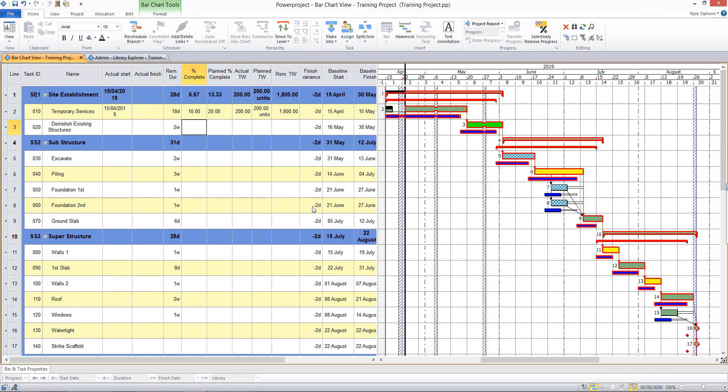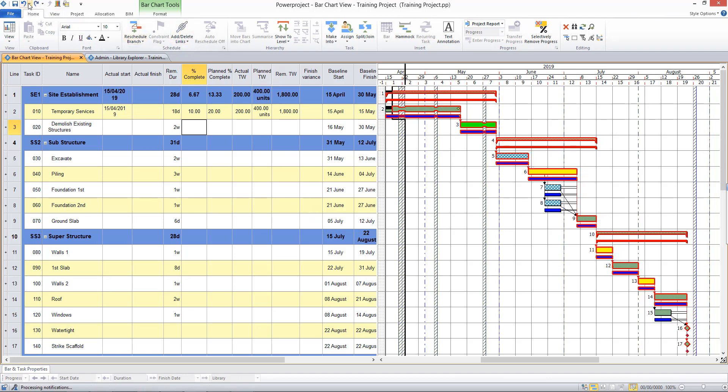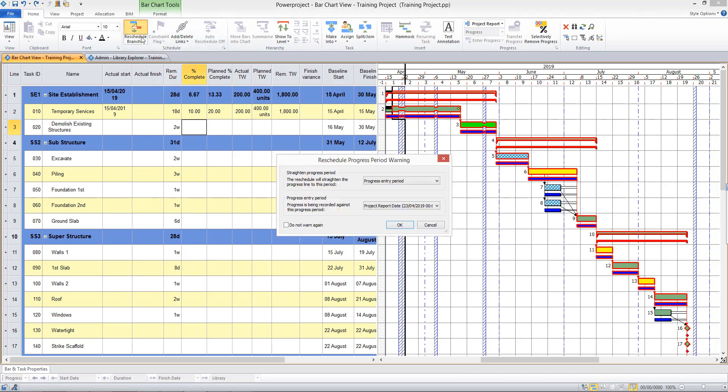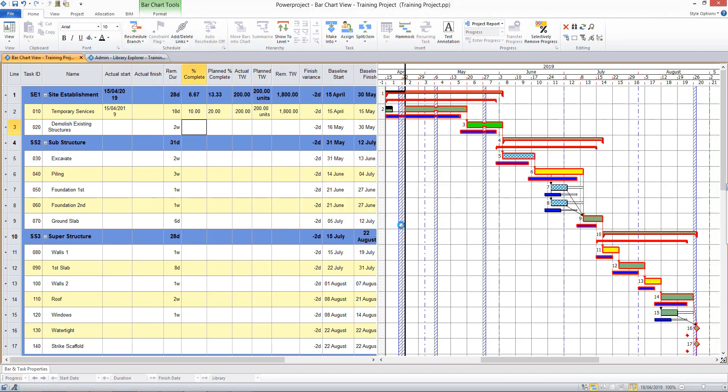In fact, the table's telling me that I'm two days behind. I can undo that, so if I prefer to keep a jagged line program, I can do so. But if I wanted to keep the line straight and maintain more of an as-built program, I would leave the line straight, so I would reschedule, leave that line straight, and I would choose to create additional progress periods to enter further progress.